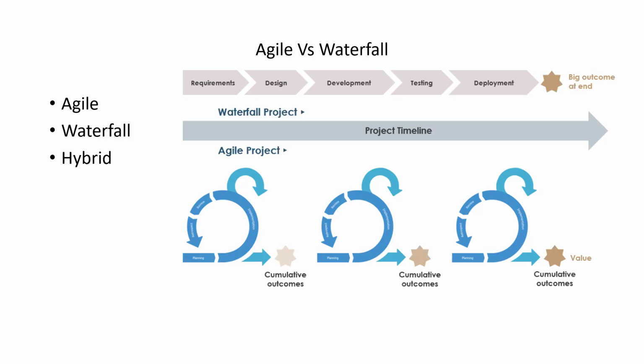Anything here with respect to prioritization? In agile, prioritization happens at regular intervals all through the project, whereas in waterfall, prioritization is done basically at the start of the project, and at the end, at deployment. Let's say some of the features which were supposed to be developed the way they were supposed to but did not, you don't deploy them. So there'll be a little bit of prioritization even at the deployment, whether this project should go ahead or should be rejuvenated to shoot off to another project. So those kind of decisions will be taken at deployment. But from my experience, those are the only two places where there's prioritization in waterfall, whereas in agile, every sprint there's prioritization happening.